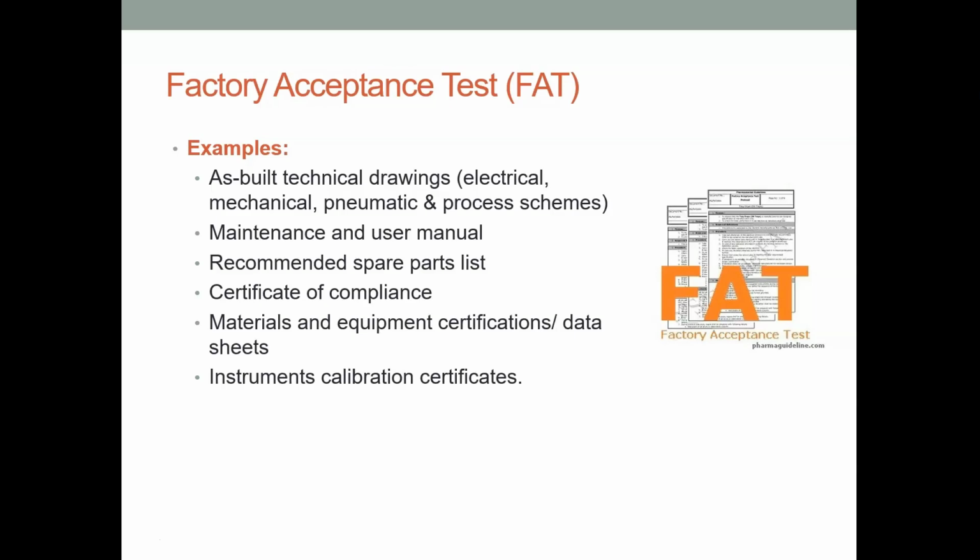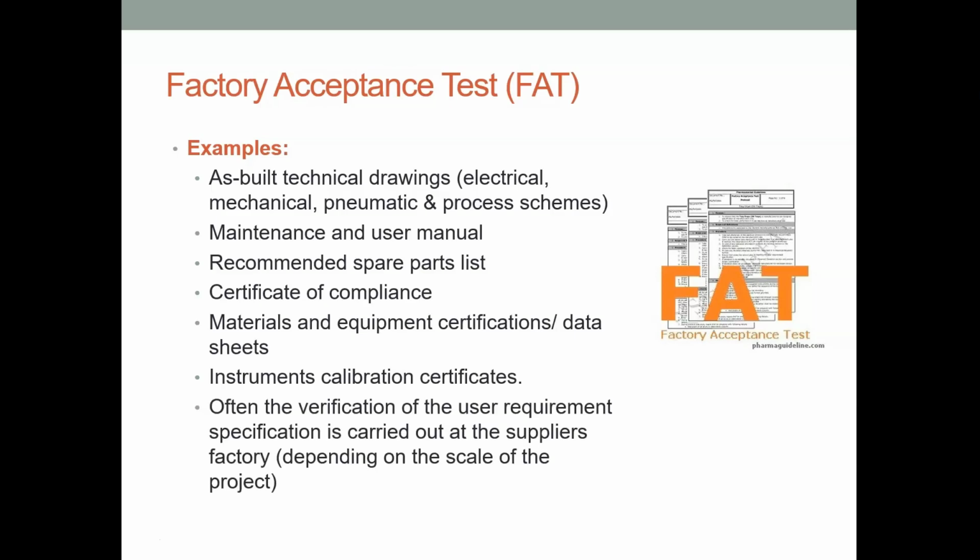Instruments and calibration certificates would need to be handed over, and often the verification of the user requirement specification is carried out at the supplier's factory, so it depends on the scale of the project. That would often happen on the supplier side.